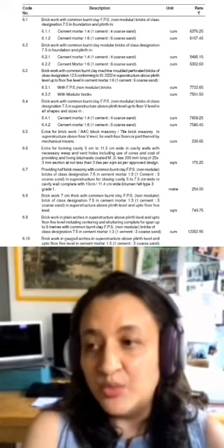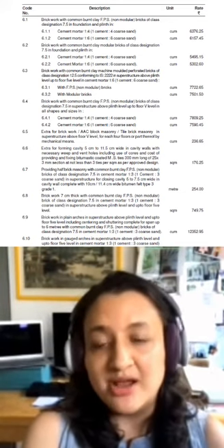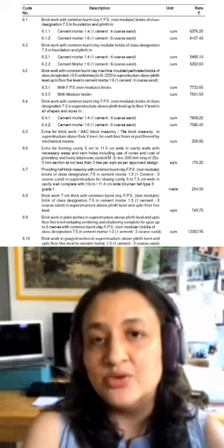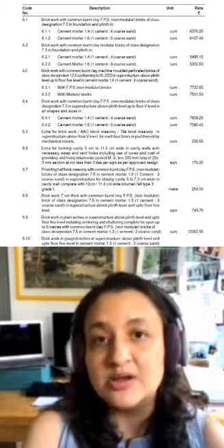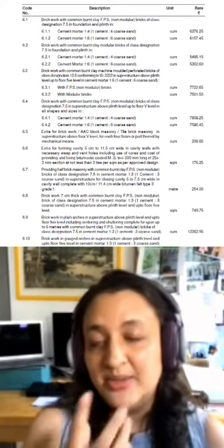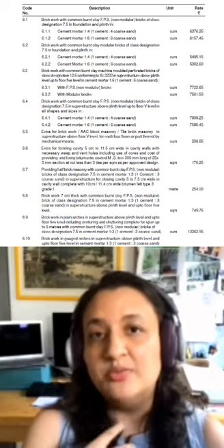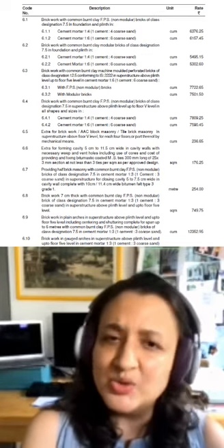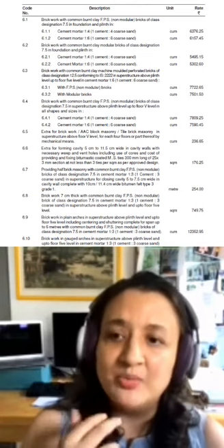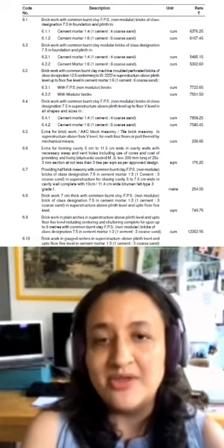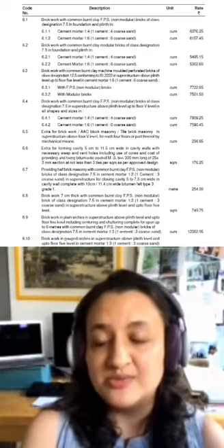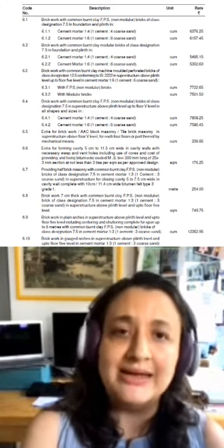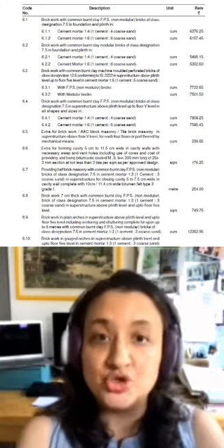But obviously for most private projects and with most private contractors, those rates are kind of meaningless, because the bid that you would get for a private project will be much higher than that rate. But it still gives you a little bit of a guideline. If you're bidding for an item that you have never built in your projects before, and you have no idea how much that will cost, then this DSR rate can give you a bit of a guideline as to at least what range you should expect.